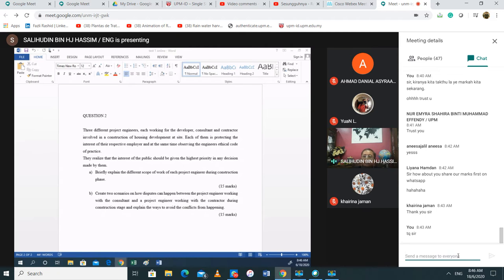I'm not talking about G7. I'm talking about smaller projects at that time, with small lower officers. The people at the site, technicians and so on, at that time there were not as many engineers as today. So the people at site full time was only one. But his job is to monitor what is being done at site, take all the records, and check. When there is a need to inspect and approve, they will call the boss, my engineer assistant, to come to the site and check.